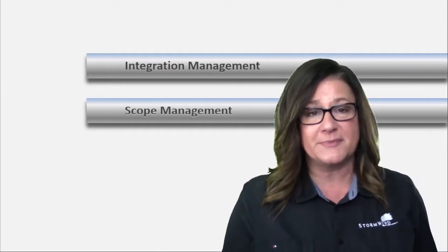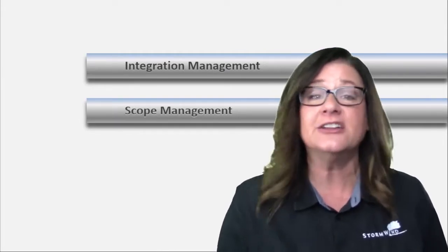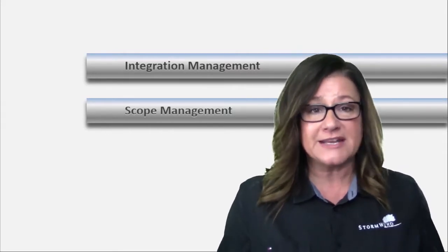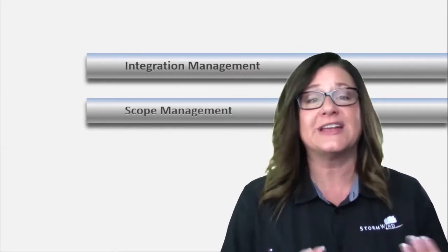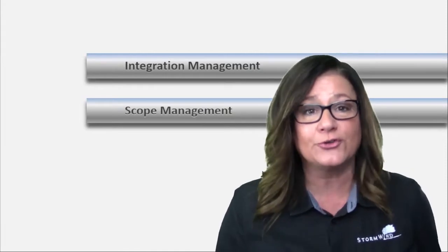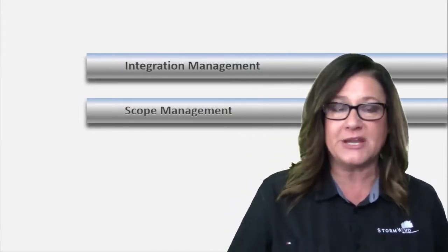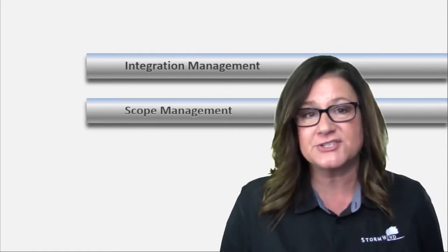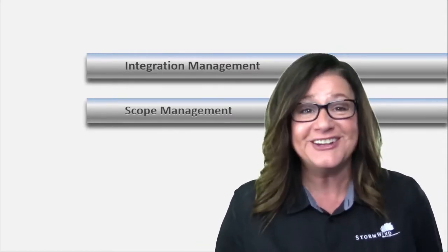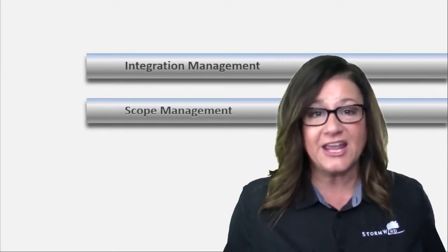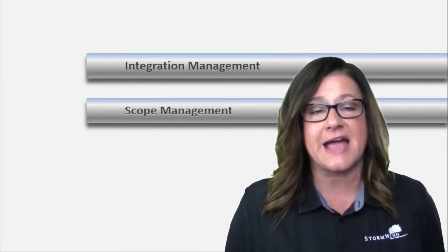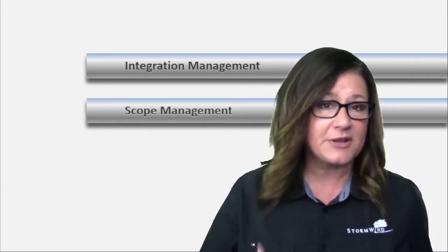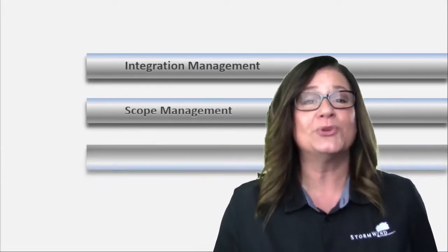It's also important to make sure that that success is validated toward the end of the project or all the way through. Validate scope is basically getting formal acceptance of the end result, typically by a customer, but it could be internal or an end user or something of that nature. Without that validation of scope saying, hey, you're building the right thing, we cannot formally close down our project. Scope of work is one of the big constraints, and typically any changes to scope of work will drive changes to our schedule.